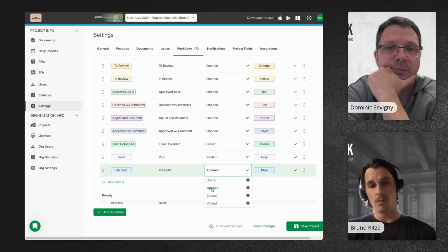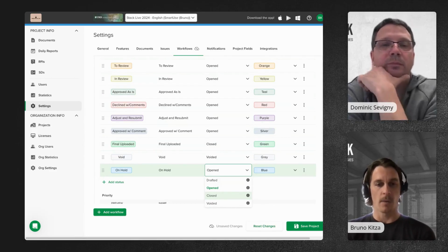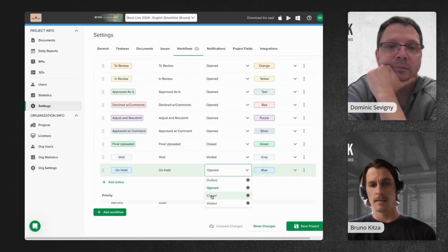We will also document the first time it's under the status open, and once it's at the status closed, we'll have an open date and close date, so we can evaluate the turnaround and know exactly when it started, when it ended, basically between those dates.